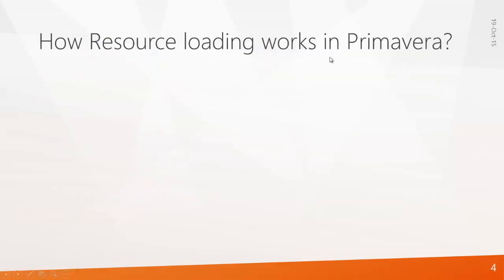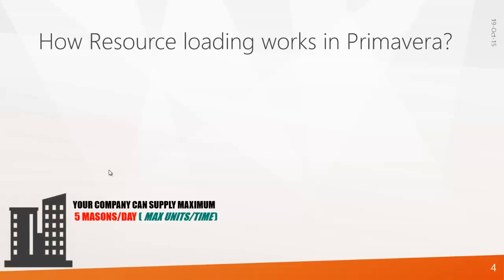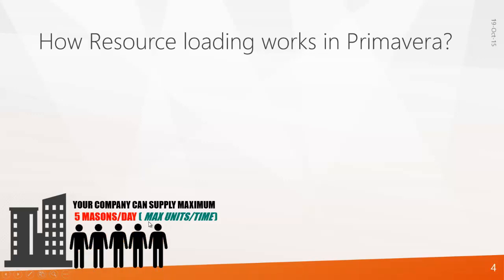Now let's see how resource loading works in Primavera. In real time, the case is entirely different from how Primavera loads resources. Let's say in your company you can supply a maximum of 5 masons per day — in Primavera, we call this maximum units per time. And each mason charges $50 per day — in Primavera, we call this price per unit.